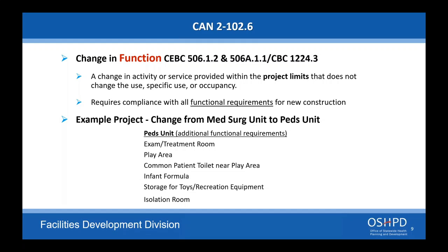You can flag it and correct it as part of this project. Again, it depends on what it is specifically. Look, if you're opening up the ceiling, you see some non-compliant conditions up there, your option is to correct it as part of this project, or the facility will be flagged as an existing non-compliant condition, and the owner will have to address it at some time in the future, probably before they can do any other work in that area. It's going to be flagged in our system as an existing non-compliant condition that needs to be corrected.